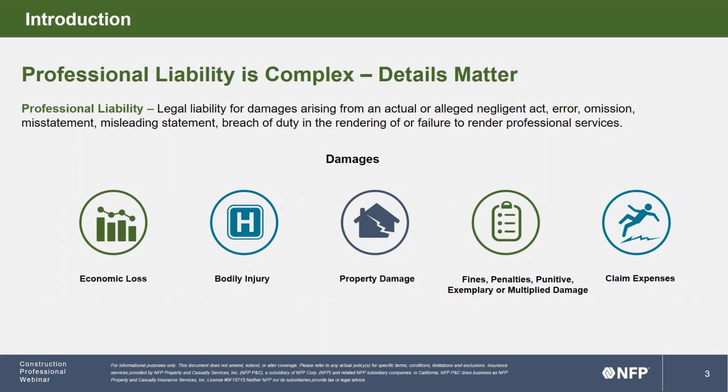So economic loss on a project can be discovered during or at any point after construction. This can include things like additional design or construction costs due to the error that was discovered. If the error results in a project delay, that might result in lost revenue to the owner of the project or developer of the project on the back end in the form of delayed opening or loss of rents. That's also considered an economic loss. After project completion, the loss might be more severe because it might cost more to fix if it requires some additional construction or fixing something that's already been done. The ultimate liability for the economic damages usually lies with the owner or developer of the project, but you can be sure that if you're involved with the project at any level, you're likely to get involved with a claim.